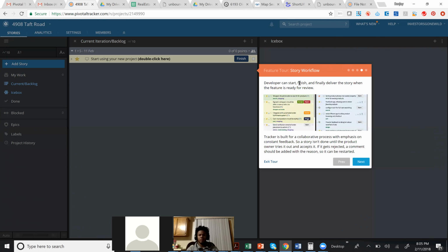And you're assigning points on every task. Say 2 hours worth of work is 1 point, or 2 points would be 4 hours, and 4 points is 8 hours worth of work. So you're dividing each and every task into that kind of category. Is it 1 point, 2 points, 3 points, or 4 points? So that means that divides as the hours.